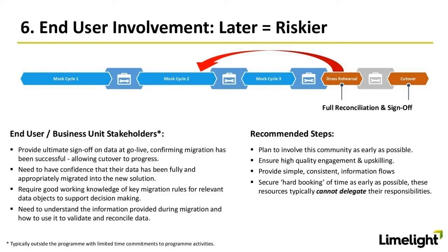This is an important one, really. It is, I think, a good idea to try and secure a hard booking of their time as early as possible. These are the kinds of resources that typically can't delegate their responsibilities. A finance director is not really going to be comfortable often in giving away that ability to sign off on their data prior to switching something on. So trying to secure a hard booking of their time, keeping an eye on obvious things like holiday plans, but other business events as well, other competing things, is very important.